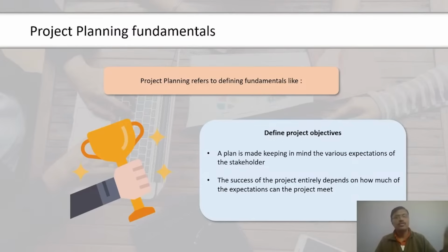The project schedule consists of, at a minimum, a planned start date and planned finish date for each activity. Although the project schedule can be represented in tabular format, it is more often represented graphically using either bar charts or network diagrams, or a combination of the two. The final schedule, which is the output of the develop schedule process, is also called the schedule baseline. Once the schedule is baselined, it can be changed only through formal approvals. Meeting the schedule baseline is one of the measures of project success.